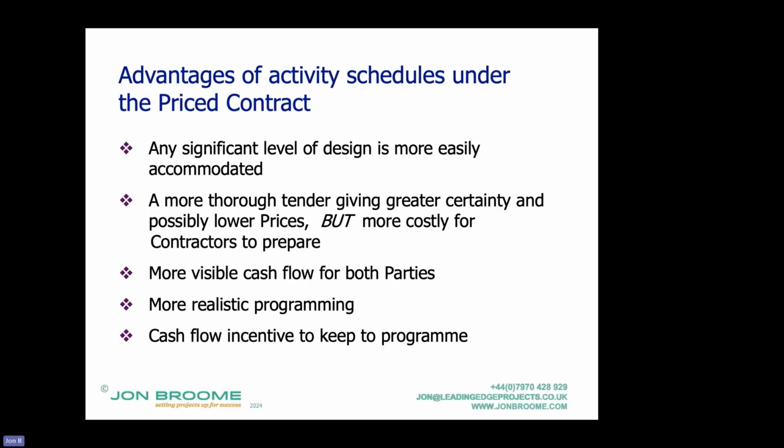So many employers, as was clients, do by some means supply approximate quantities with lots of disclaimers on them. Or what happens is they employ a firm of QSs to take off a bill of quantities, report back to them if there's any errors which they spot as they're doing it, but then tell the contractors, this firm of QSs has got a bill of quantities which you can buy from them.